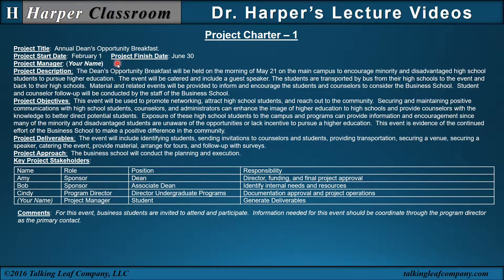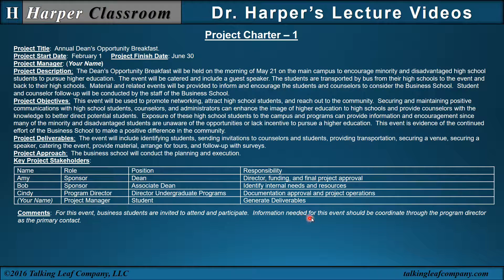Here's an example of a project charter. We have the title, the date (start date and finish date), the project manager, and a project description briefly describing who, where, and what's being done. The objectives explain why it's being done and the value, while deliverables identify the expectations from this project and the definition of success. The project approach indicates the business school will conduct the planning and execution as the institution of responsibility. Key stakeholders identify who's going to be directing it, and comments note that business students are invited to attend, with information coordinated through the program director as primary contact.